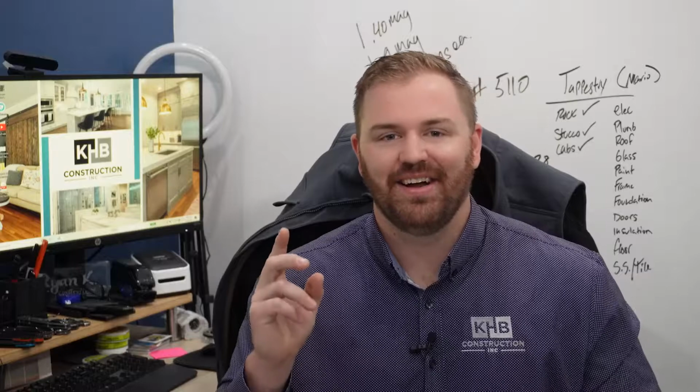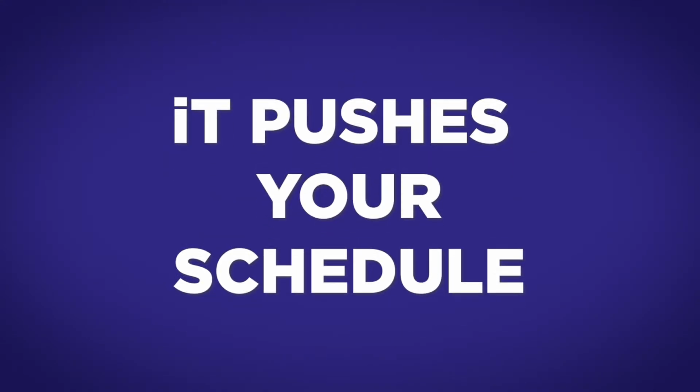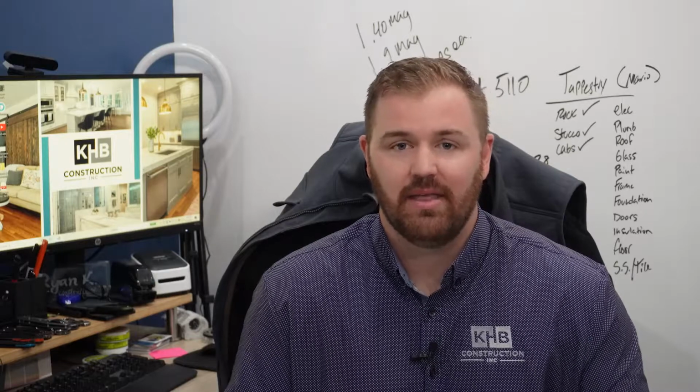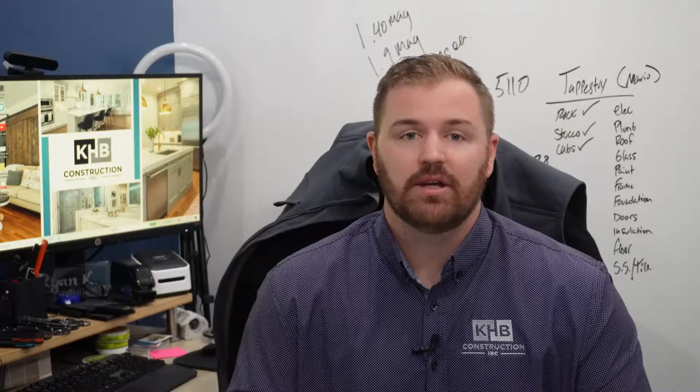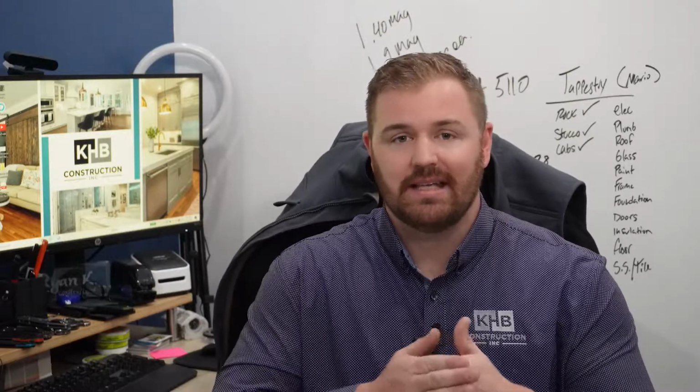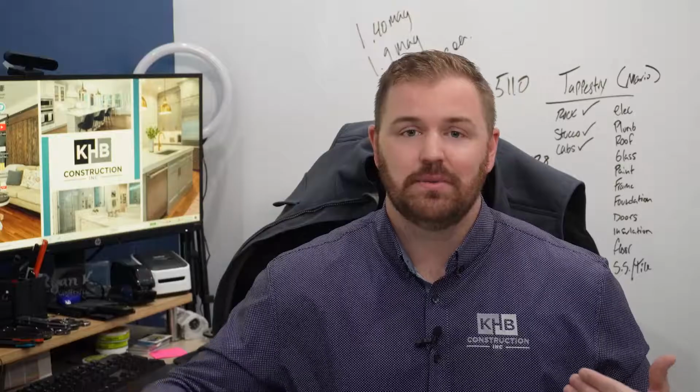Number 2, but really number 1, on why change orders cost the way they do is a change order to the scope of work pushes your schedule. Oftentimes it pushes it just a day to create the change order depending on the size of it. And then there could be another day, 2 days, 3 days to perform that scope of work. So with that, it expands your schedule into time that was not allocated for your project.